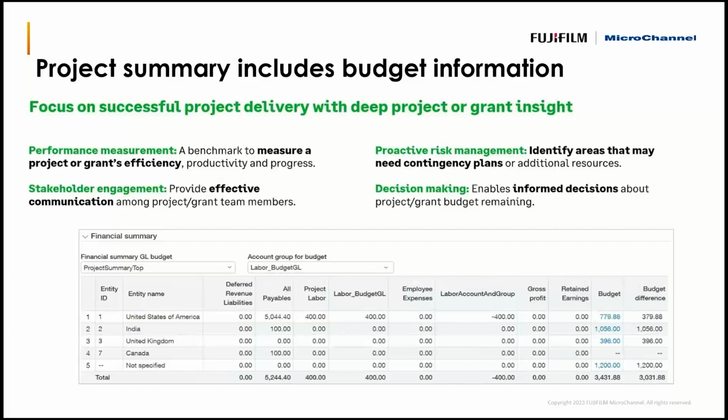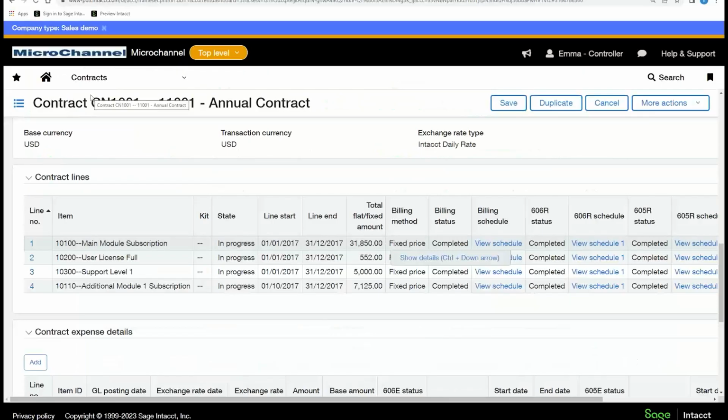When we looked at projects initially, and I'll show you on the screen again, we've got the ability to just enter the value there on screen for our expected budget on revenue, expected cost, expected labor, for instance, or expected duration in hours. But it's not a financial budget. In this case, once we start allocating that financial budget, we can then bring that through on screen, and you can look at those comparisons or variances as we process that. So it gives us a few more options in that instance.